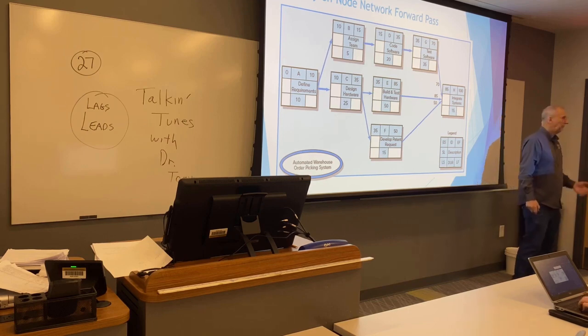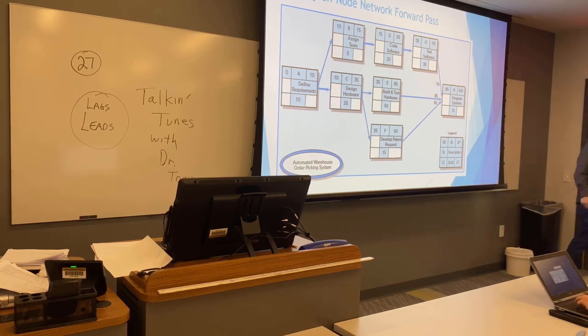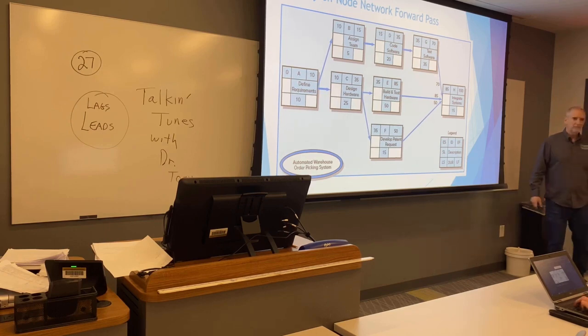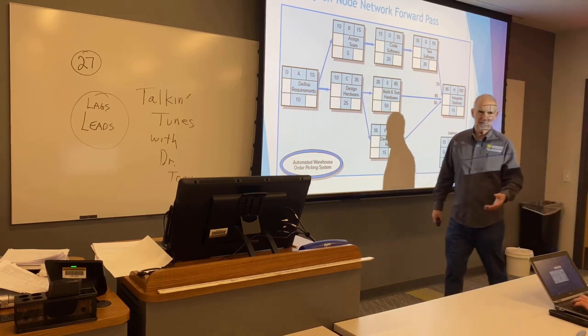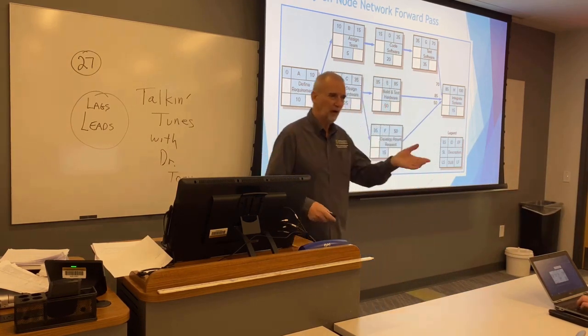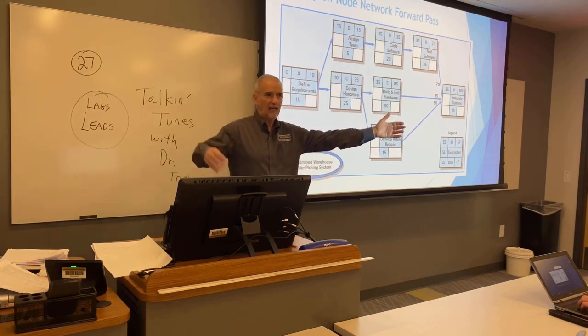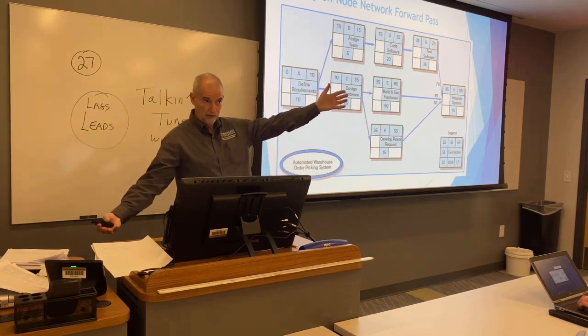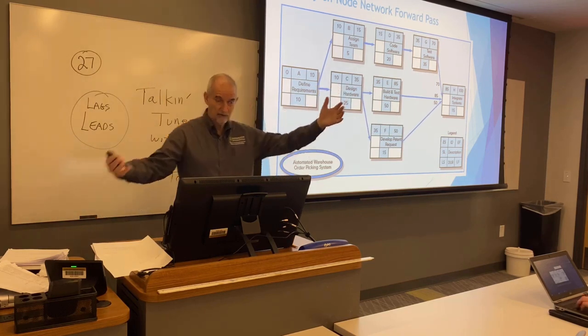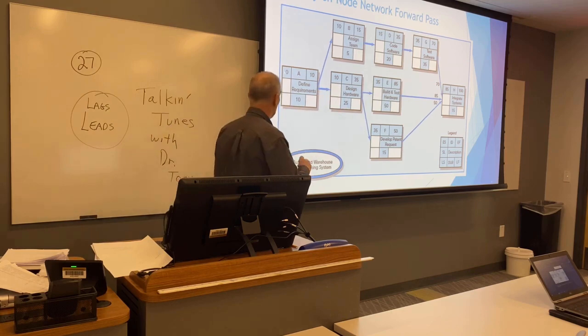Both of us, because both ways are fine. Some say tomato, some say tomato, right? Either way is fine. But once you start using a method, you've got to be consistent. So look at this. This is starting on day 0. Is there a day 0? No. But some people use it. I put day 1. Starts day 1 and takes 10 days. Starts on Monday of week 1, going to end Friday of week 2, right? 5 days, 10. You got it? So you could put 1 and 10.